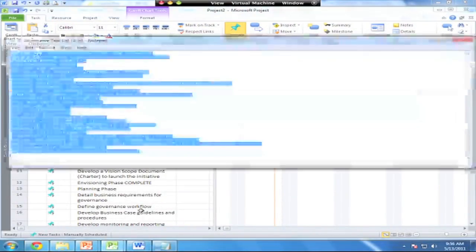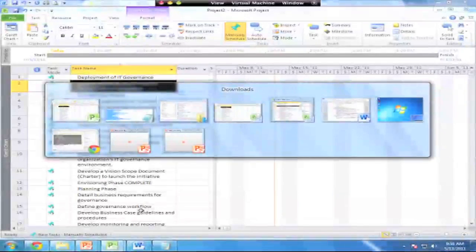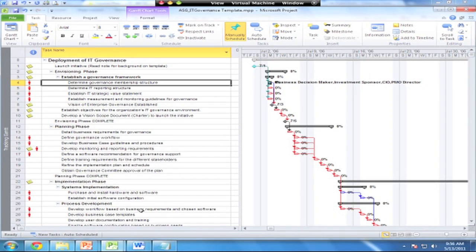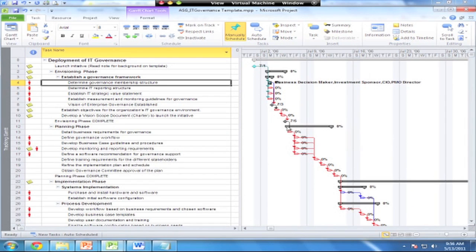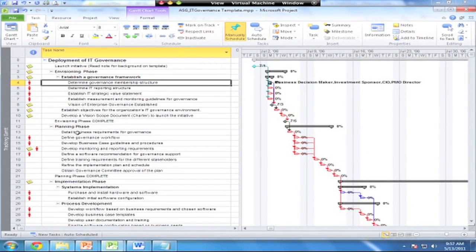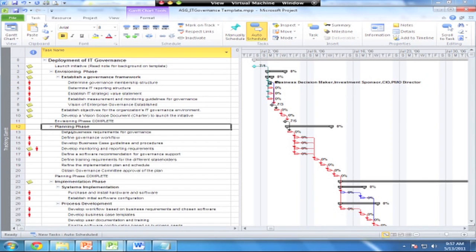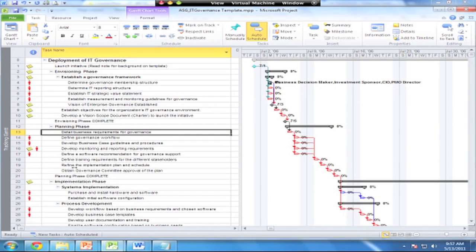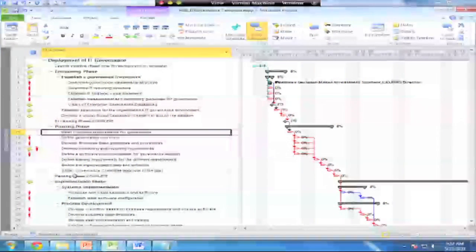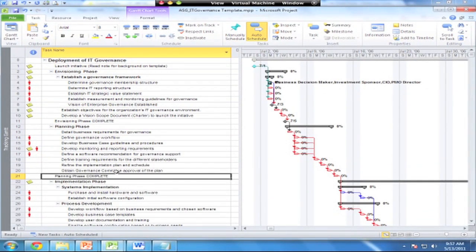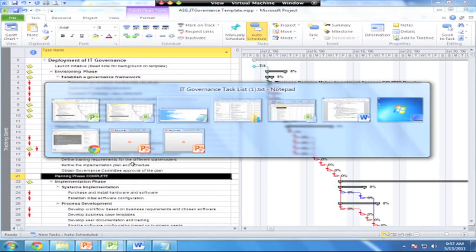You'll notice in this list it looks a little different than my other project list over here where everything's all nice and indented and you can kind of see how things fit together. I've got summary tasks on this list that show, okay, this is a set of tasks that fit together from start to finish in the planning phase. Here's the planning phase and here's all the sub-tasks that fit below the planning phase. I even have an event down here at the end, 'planning phase complete,' that we can make into a milestone.